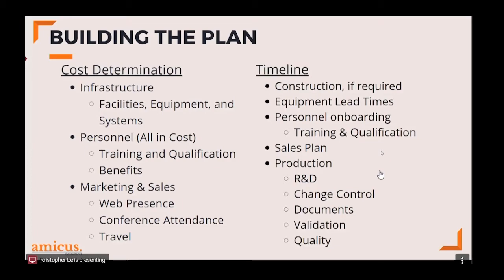I mean, to be in a scenario where if you don't plan out properly, you're adding on all this capacity potentially on, let's say, a warehousing side, but you're not properly timing when equipment's going to come online. So now you have all this space that can be used and a bunch of people sitting around waiting for, let's say, an automated filling system to be up and running, rather than trying to get all of that to time out where it's coming online at the same time and you're working in a very efficient way.